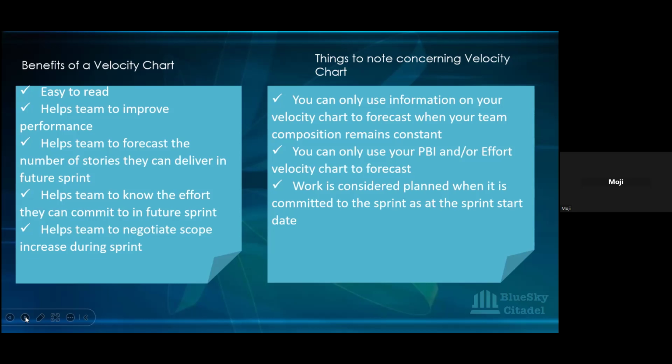So as a Scrum Master, also look at when the story comes in. Okay, so I know that Agile says we can bring things in. You're adaptable. There's agility, yes, but you also have to kind of plan things. So a 13-point story coming 2 days to the end of sprint? Come on, let's be realistic. It's not gonna be done.